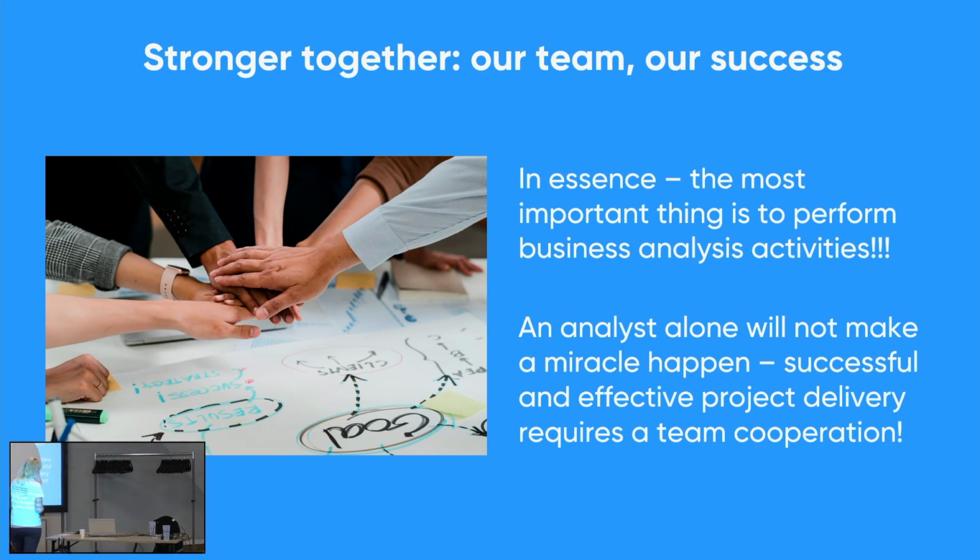So it depends, if there were specifications. If they were not written, then it's a change request and you have to do it, but it's not a bug. And how to do it? You solve it with the business again, because if you add additional requirements, then the scope... you have to look, something has to come off the sprint to do that change request. But yeah, it depends on documentation. Sometimes it's bug fixing just because it was mentioned, it was discussed, it was clarified, and it was missed. But if it's a change request, then...